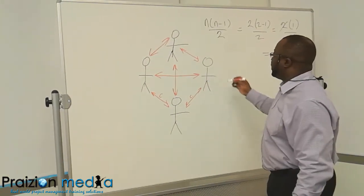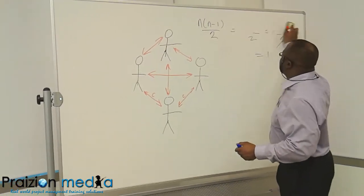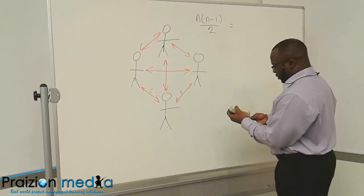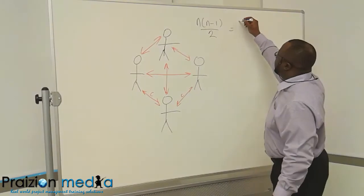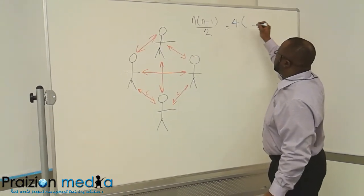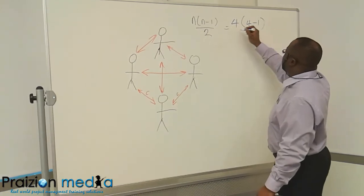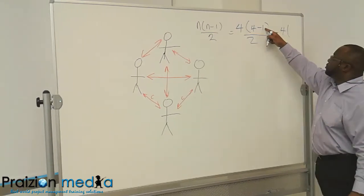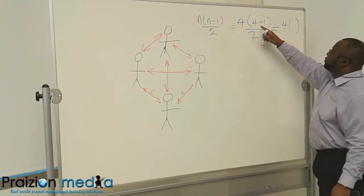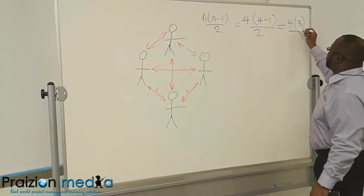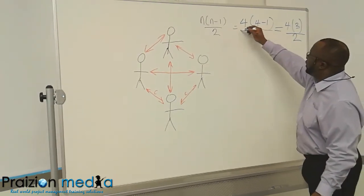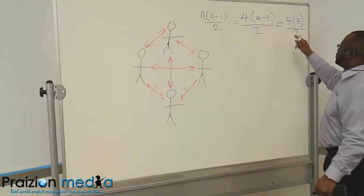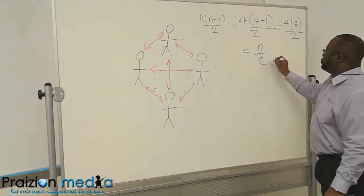So if you apply the formula again, N is going to be 4 times 4 minus 1 divided by 2. And this would be 4 times what? 4 minus 1 is 3, and all of that divided by 2. It's the whole thing divided by 2. So that's going to be 12 divided by 2, which is 6.